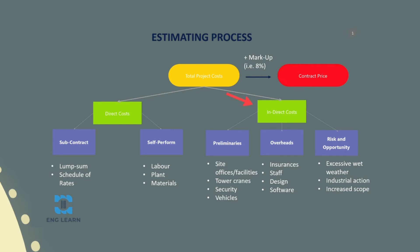Next, we need to determine our indirect costs. These will consist of preliminaries, overheads and our risk and opportunity. We'll quantify our preliminary costs based on identifying all of our preliminary cost items and quantifying them. We'll determine our overhead costs by creating our project organisation chart and estimating staff salaries. And finally, we'll work out what contingency we need to allow for by developing our risk and opportunity register.